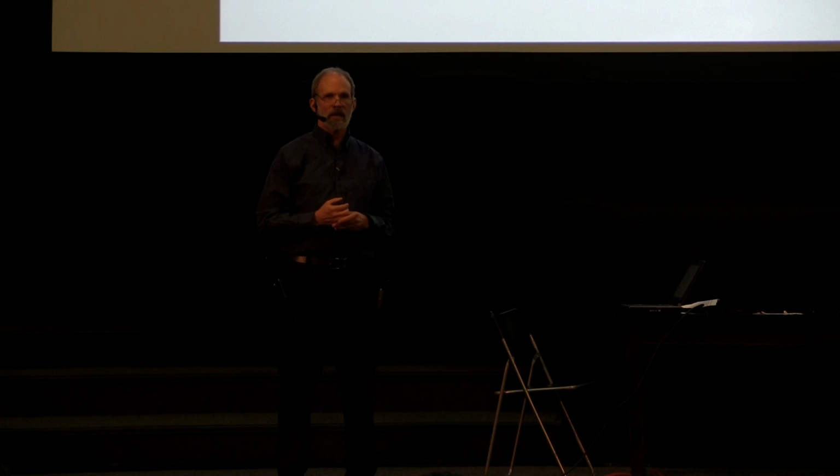I'm glad to say that I have learned an awful lot, and I can estimate my time fantastically much better, and so now I only use a factor of 1.5, because I'm still very optimistic when I actually think about how much time it's going to take me. So when you're looking at timing and costs of timing, please put in some kind of buffer, because things are never done quite as well as we think we can do as engineers.